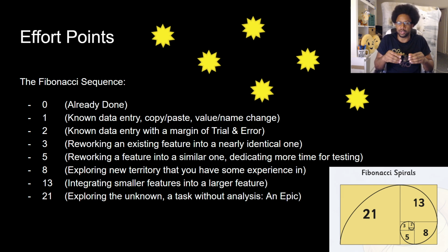The reason we do it like this is because when you're doing that task, which you think is a 3, and it takes you, say, an hour and a half, you know that the next task is probably going to take longer than an hour and a half because the laser shooter is more difficult than the bullet shooter. Then I could say I need to do rockets. Well, actually, rockets are different to bullets, but easier because they don't move as fast. You're less likely to get bugs from high-speed collisions. On the flip side, they require additional animation and maybe they don't travel in a straight line, but generally speaking, they're either the same or easier than bullets. So it would be a 3 or a 2, depending on the exact nature of how you want this to work.